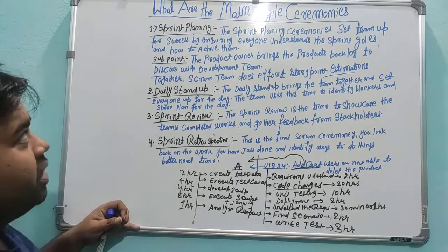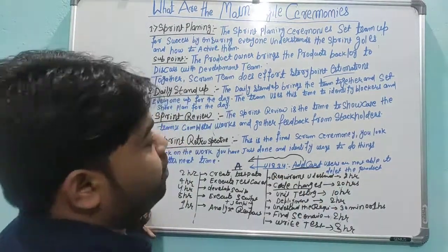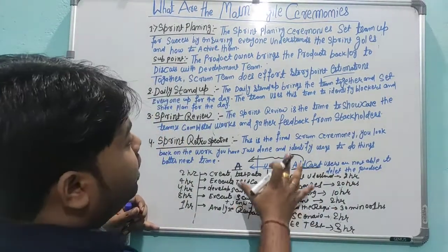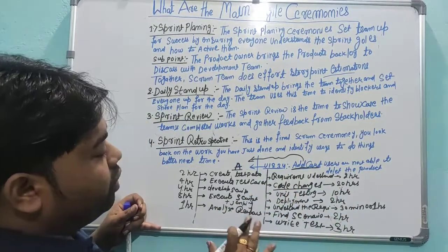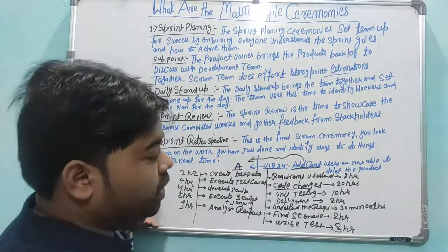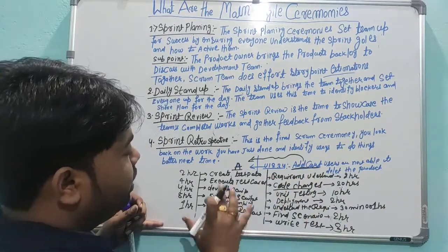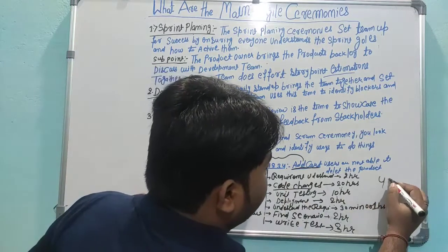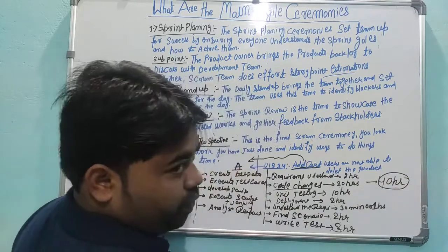So this estimation you have to provide for each user story. Got it, right? Accordingly we can estimate, because if you are experienced then you will get the idea of the estimation. If you go for the complete hours, whatever we have, like I'm just taking, this is your 40 hours for one user story.